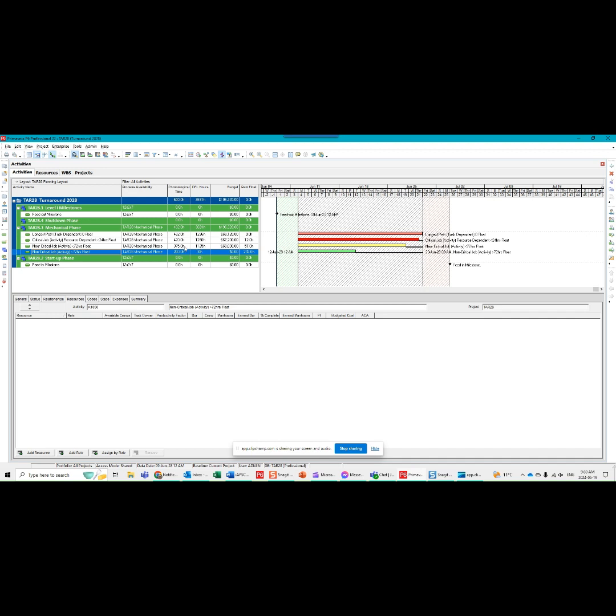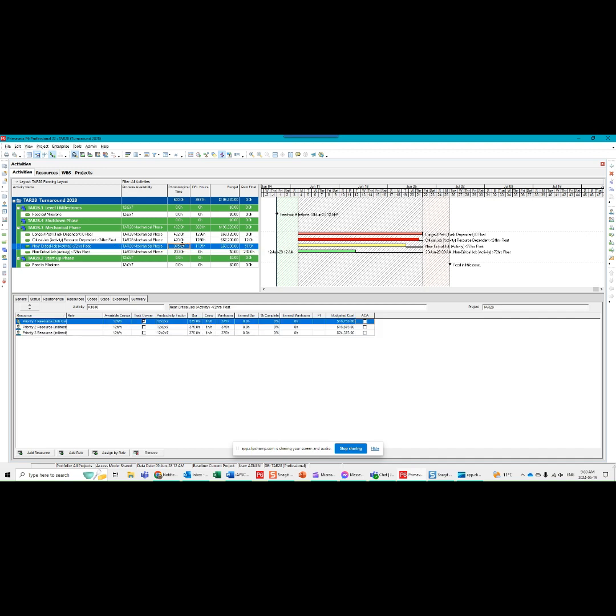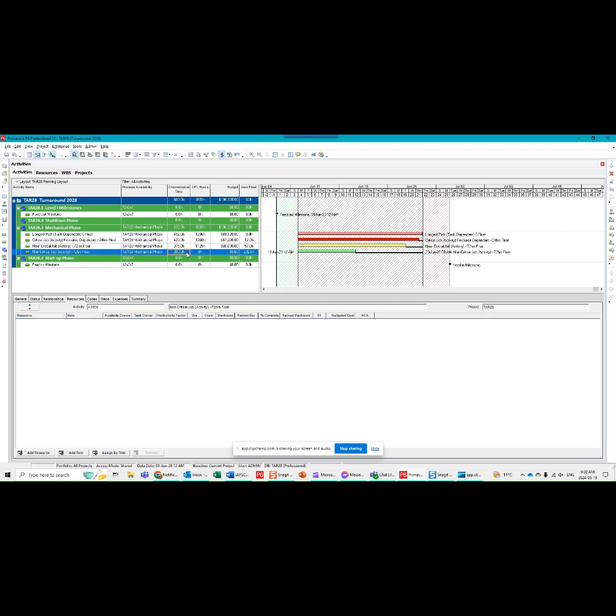So you'll see here that if I was to change the burn up float, when we talk about burning float, remember float is absolutely important to us and we don't want to be burning float. But if we are burning float for whatever reason, and we become increasingly more, to a level of burning float, and for this example, I'll go with 389 duration. Now I'm down to 43 of remaining float, so it has turned this bar to yellow.